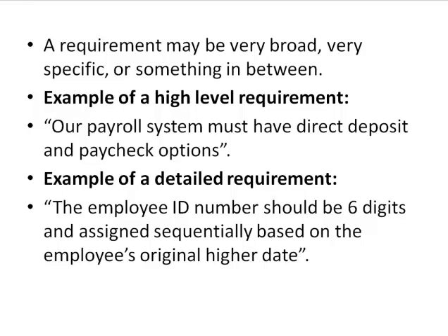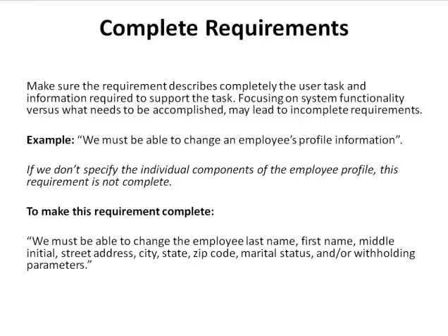So see how detailed that is? You've pretty much got everything you need on that one, right? There isn't anything that's left up to assumption when you read that requirement, and that's what you want to think about when you get a requirement. If there's anywhere where there's a question or where you would have to make an assumption, then you know that it's not detailed enough. So think about it in those terms when you're looking at, do I have enough details in my requirements?